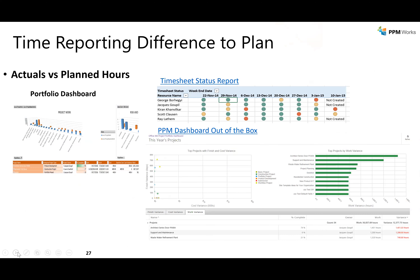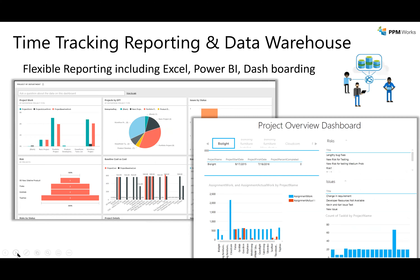Having everybody on the team submit status removes the burden from the project manager of chasing people, and eliminates those arduous status meetings where you sit around a conference room while someone takes two to three minutes telling you what they did — and you're only really engaged for 30 seconds of the whole hour. Submitting time and being able to see that information in the system — that's really the power of the time savings.